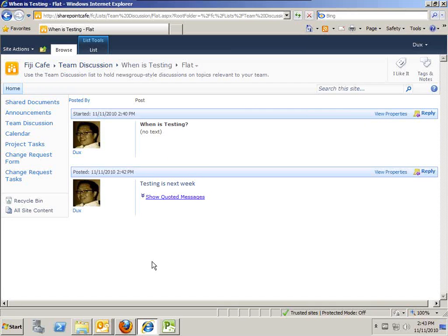And I want to hit on that, Asif, because I don't know about you, but I'm in DC. In some of my projects, I have to comply with certain regulations. Absolutely. And a lot of these regulations require keeping information for so long. So what if 5 years from now you got audited? I mean, Sarbanes-Oxley, for example. Sarbanes-Oxley regulation, you've got to keep financially related data for 7 years. Let's say this is a financial project, and you got audited 5 years from now, and you got the question, who said this, who asked this, who changed this?